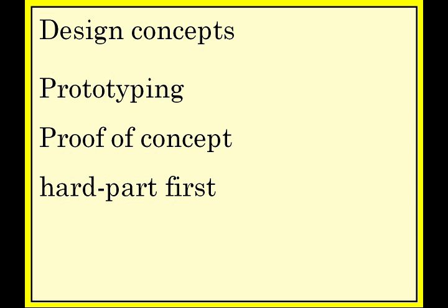Why? Well, A, you need to get going because they are going to take a while. You need to invest the time up front such that you can do it. And B, let's say it turns out that you can't solve that particular problem. Well, you'd like to know sooner rather than later to either renegotiate with the client and user or then start some other approach to it. Hard part first, counterintuitive, but important. With everything we do in information technology, there are always trade-offs.